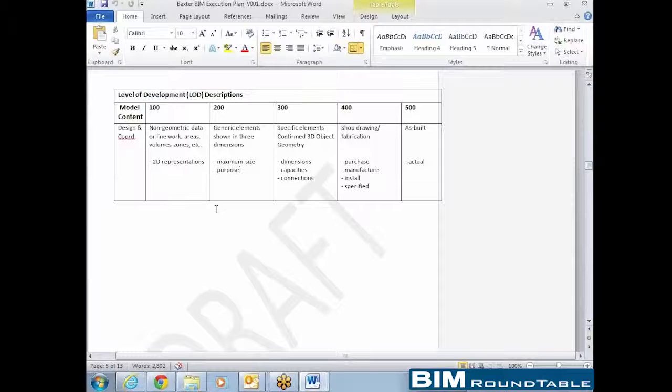If you just have a single column that's 200 and you start listing out all the items, you're going to get arguments about who gets what first. So adding .0, .1, .2, and .3 allows you to organize it so that people can get what they want and get it all done within the 200 level before moving on to the 300 level, if that makes sense.